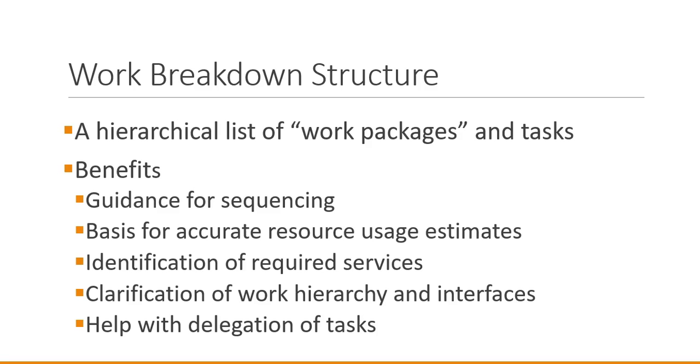We can also use the work breakdown structure to help us identify required services that we might need to contract outside of our organization. Once we're looking at detailed task level activities, services that we might need that we weren't aware of originally will become clear.